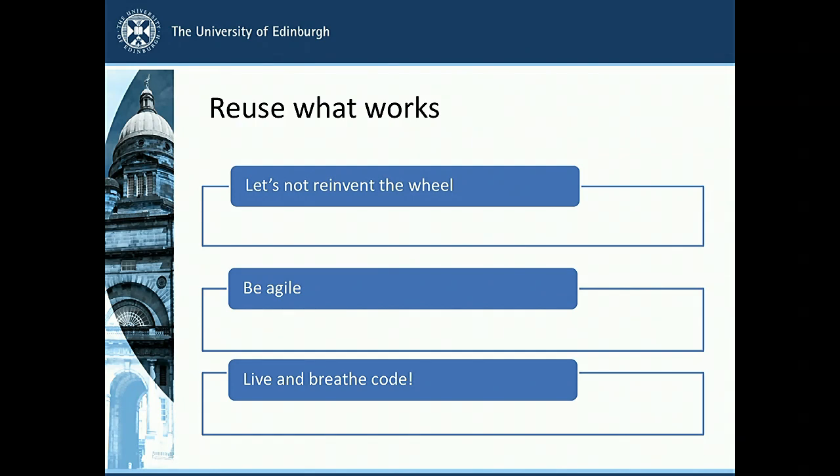This is how everything's going to work. And some things did work really well. Other things didn't work particularly well. So some of the roles we changed throughout the project. At the end of our iteration, we always looked at what was not being so good, what do we need to do better next time, and we didn't just write that down, put it in a meeting note, but we actually went back a few iterations later and looked at that and said, well, we said back in December we would do this, have we actually done it, is it better now, or do we need to make further changes?